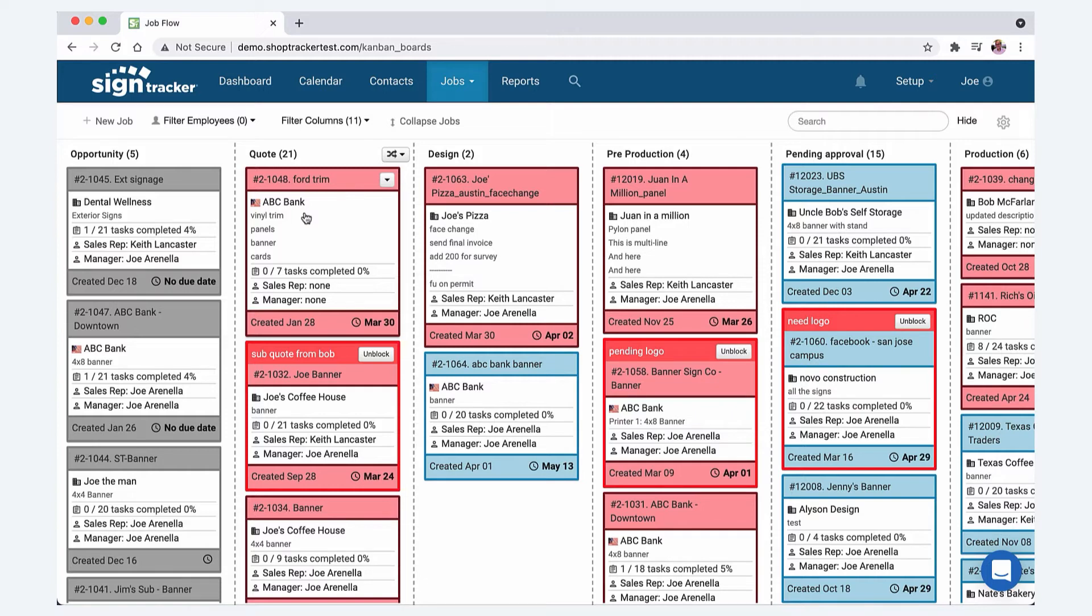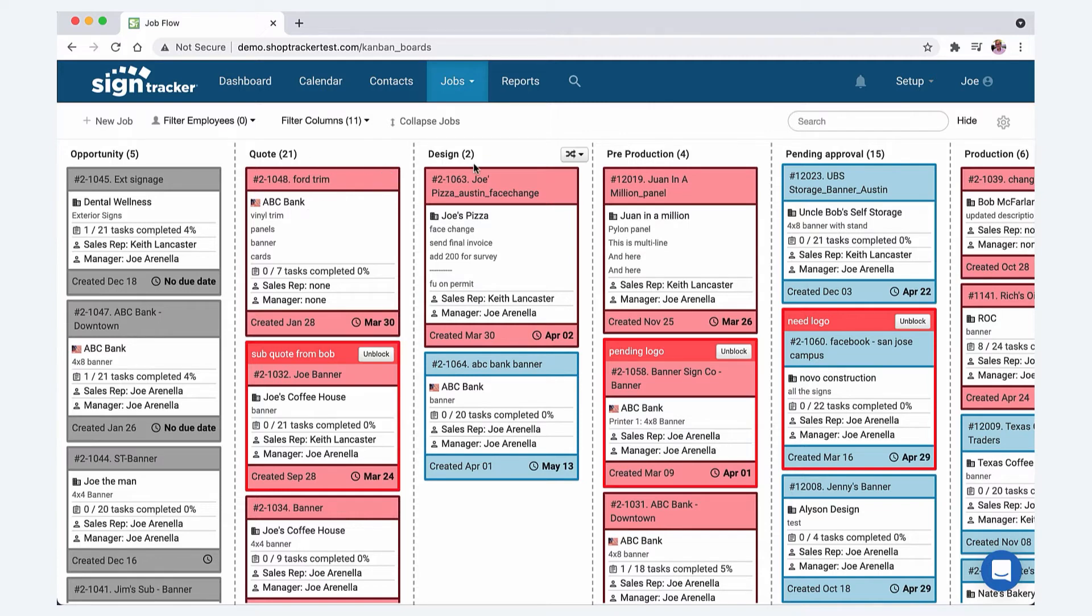That's why on the job flow board your first column you can name it whatever you want. I think when you open up SignTracker for the first time it's new job and then it's pre-production, production, install, delivery, and closeout. If you want to change your first column name to opportunity that's a great way to go, and then your job will just show up there and you can move it through your system. Each of these job flow columns actually represents a stage of production.